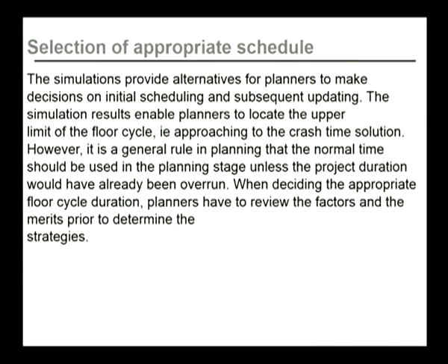The simulations provide alternatives for planners to make decisions on initial scheduling, and subsequently they keep on updating. The simulation results enable planners to locate the upper limit of the floor cycle, that is approaching the crash time solution, the maximum time required to complete an activity. However, it is a general rule in planning that the normal time should be used in the planning stage unless the project duration would have already been overrun.